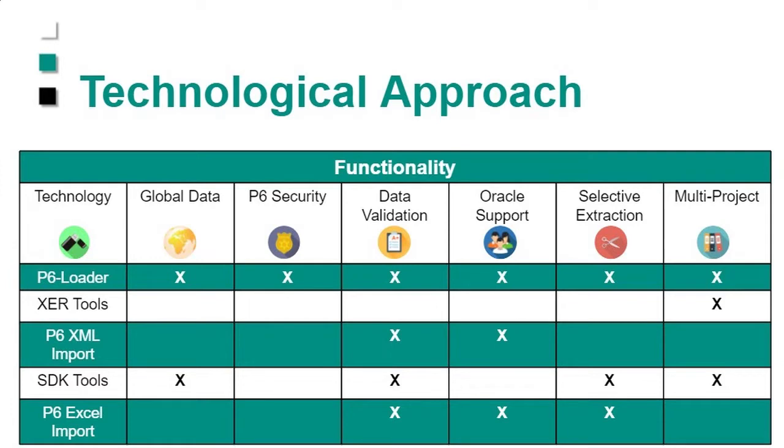So there's another option, the SDK. Well, the SDK stood for Software Developers Kit, and it was Primavera's first shot at making an integration program available. But there were some challenges with it. The biggest one was that you had to be an admin super user to use it. So it would touch global data. It was validated. It did let you do selective extraction. It did do multi-project. So it had all the tick boxes, except you had to be an admin super user to use it. So the only people who could use it were system administrators. The average user could not use it. The other thing is it's no longer supported by Oracle. So they dropped support for it about 5 years ago. So if you're still using an SDK based tool and it fails, you're on your own.